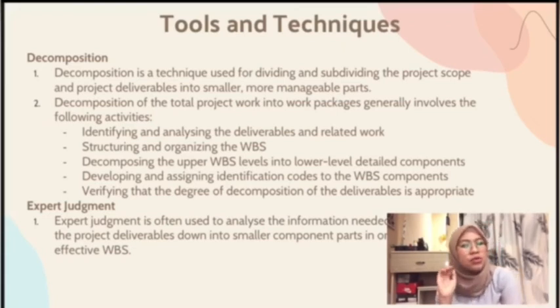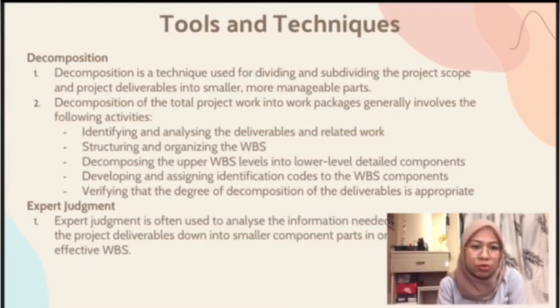The WBS represents all product and project work, including the project management work. The total of the work at the lowest level should roll up to the higher levels so that nothing is left out and no extra work is performed. This is sometimes called the 100% rule.